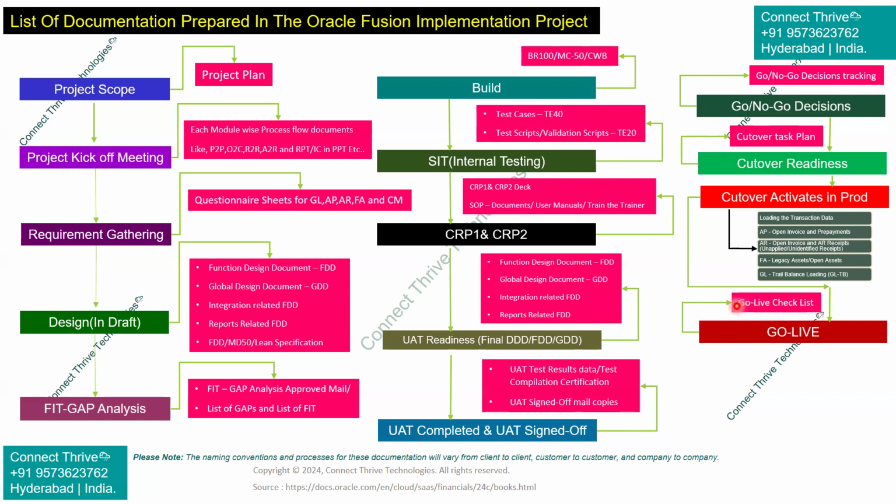We can verify whether configuration is done, reports are ready, report related integrations are moved to production, and some integration related activities, security related activities, license related activities, and bank account related masking. And the users provisioning, roles as well as access. So everything we have to check in the go no go checklist. We have an entire list.